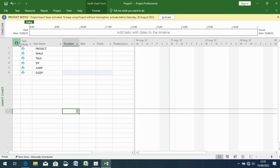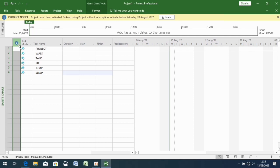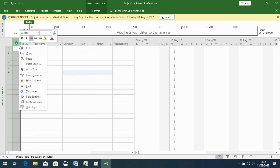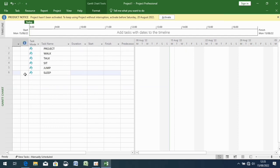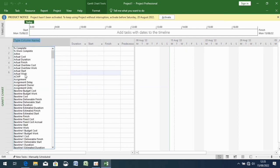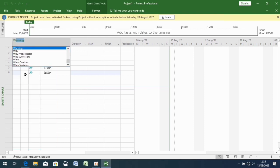Hi guys, this is a correction for Part 5. What I was supposed to do is double-click, then create and insert a new column. They wanted it to be WBS, so you type W on the keyboard and it will bring up options — then you choose WBS.